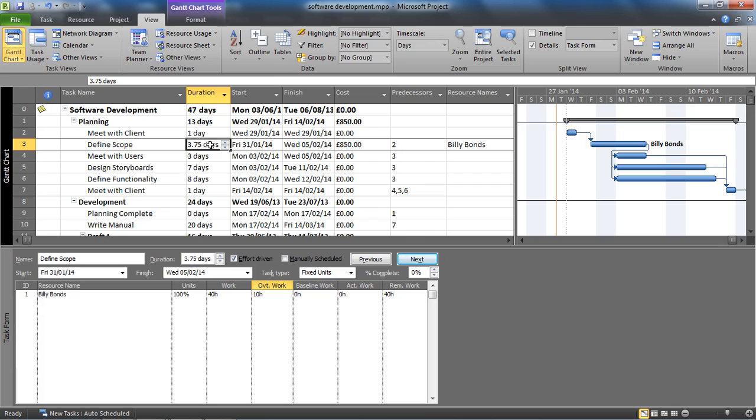Which is a fair assumption, probably why you're doing it. So 30 hours scheduled work now, as it falls into 8, 16, 24, 32, the eight hours a day is just shy of four days. It is three days and six hours worth of work, or three and three quarter days. That's why Project has done that.